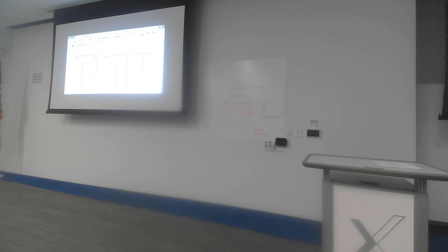I has been completely crashed out, so I can't look at I anymore, because that's been crashed to 2 and that's the limit on it. That was that one. The next cheapest there is C. So again, I'm going to look at C. C is on the critical path, so it definitely is a contender. There's no other activity there that is on the critical path and is cheaper than C.